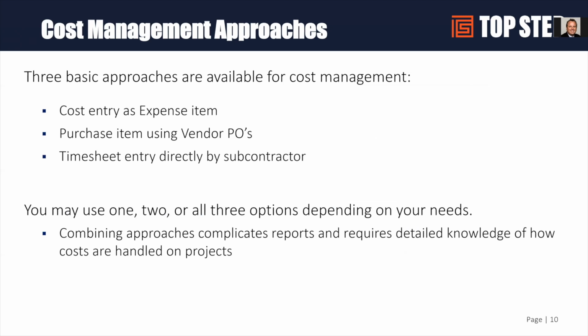As you're fulfilling those POs, those costs show up and are reportable against your project. If you're using NetSuite as your ERP, you can take vendor bills from NetSuite and integrate them into the OpenAir purchasing module to create those vendor POs directly from the feed from NetSuite, rather than doing it manually in OpenAir. The purchasing module was really designed to add cost to projects where it's not time-based or based on an expense report. Any third-party cost could be entered and managed there.